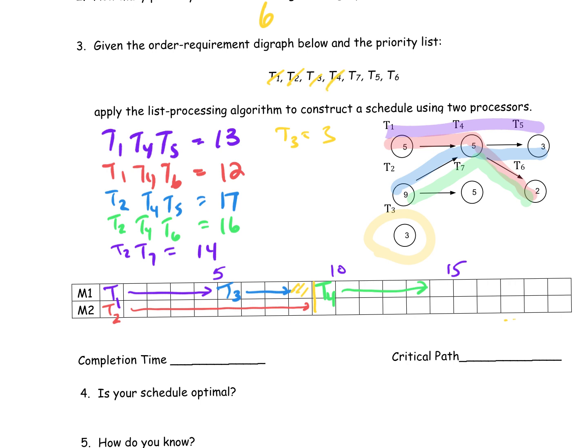Now I look at Task 7. It's dependent only on Task 2. Task 2 has to be done before we can schedule Task 7, so I can bump it right up to Task 2 on Machine 2. Its completion time is 5, so I need 4 more boxes. Take it off your list. My next one is Task 5, dependent on Task 4. Task 4 is done on Machine 1 at 14, so I just bump Task 5 right next to it. Its completion time is 3, I need 2 more boxes. Take it off your list.